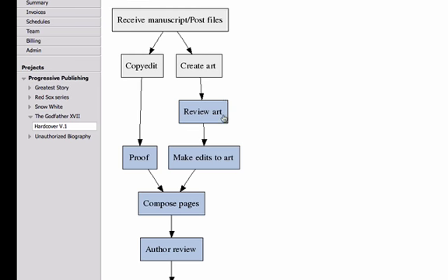I wanted the review art task to lead into the make edits to art, and that to lead into the compose pages, and all the files to flow accordingly. So that worked out for me. I've inserted a new task.